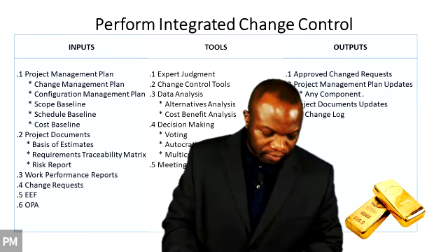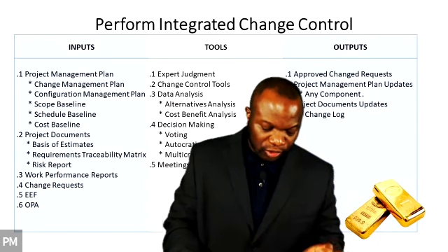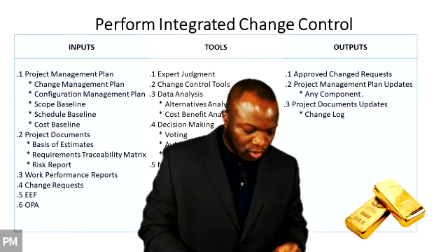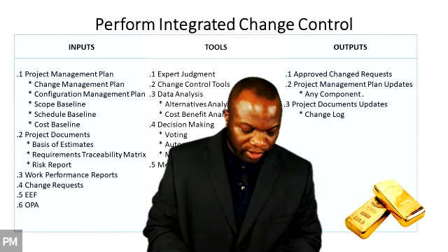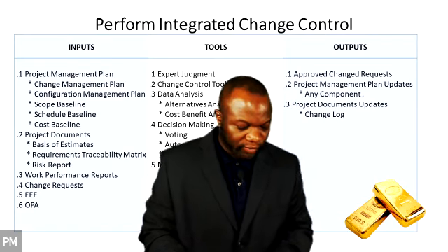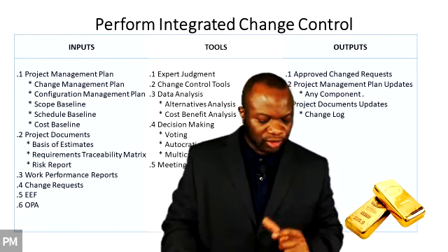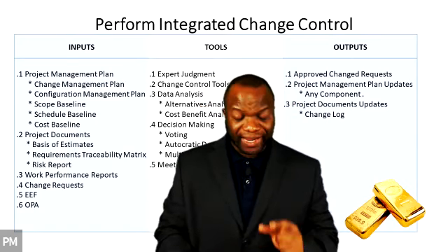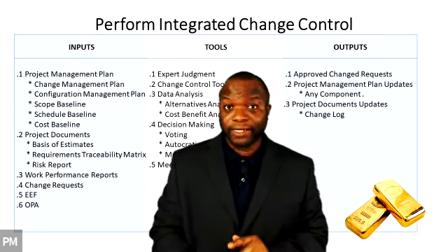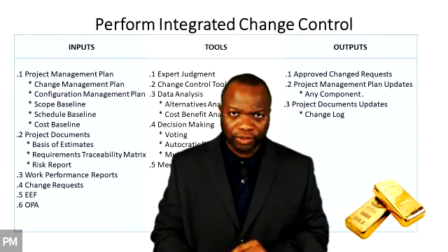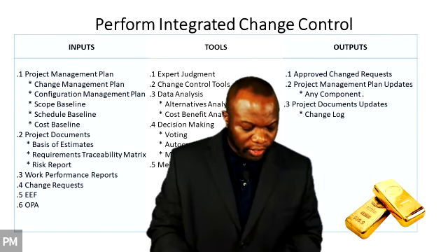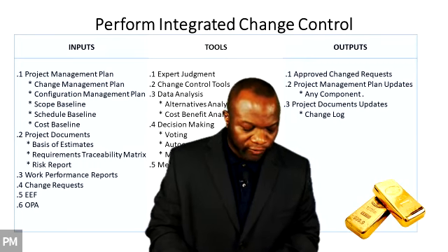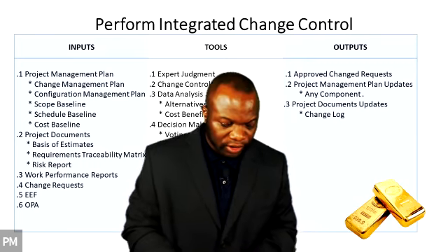Tool selection for change control tools, second paragraph here on page 118, under change control tools, it says tool selection should be based on the needs of the project stakeholders, including organizational and environmental considerations. And then it says you should do the following as part of your configuration management activities. Highlight this. You got a highlighter? I hope you've been highlighting all the stuff I've been telling you. Hopefully. All right. It says identify configuration item, record and report configuration item status, perform configuration item verification and audit.